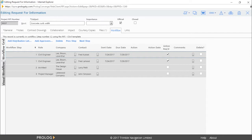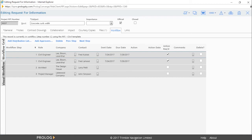When configuring ad hoc workflow, use the add approvers button to add new rows within the grid and the delete button to delete the listed contacts. Finally, use the previous and next step buttons to set up the order.